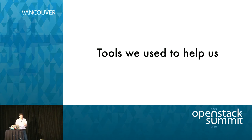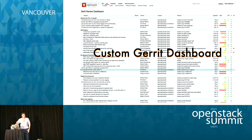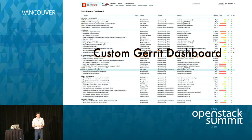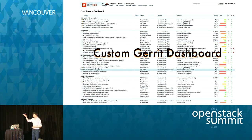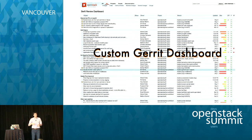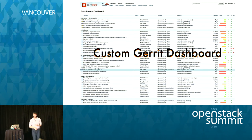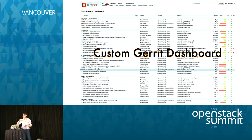One thing I like a lot is a custom Gerrit dashboard. The infra team in OpenStack upgraded Gerrit with the ability to give you custom dashboards. We've got two in Swift right now. The main one is a general review dashboard grouped into a few sections: patches starred by the PTL as priority items, specs that need attention, and as we were going through Storage Policies and Erasure Codes, a section specifically listing the Erasure Code patches. This way everyone can know what's going on.